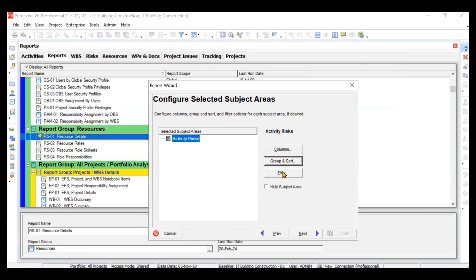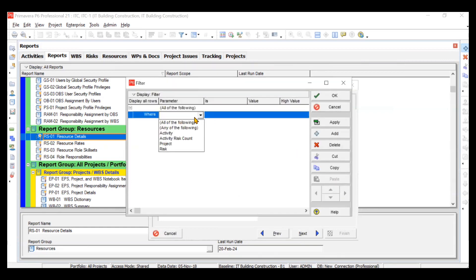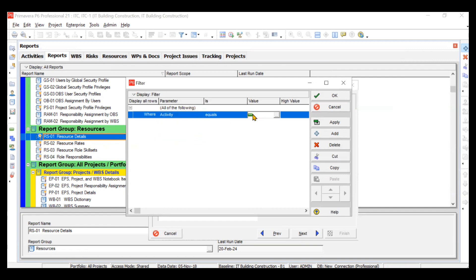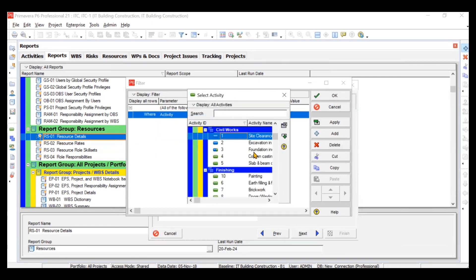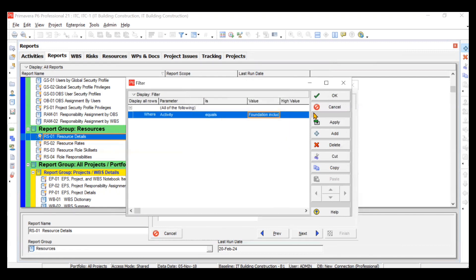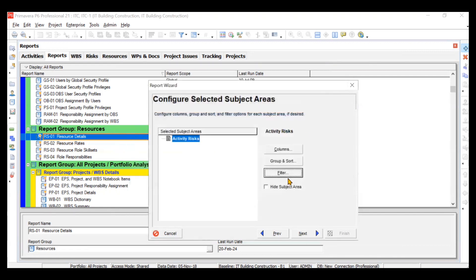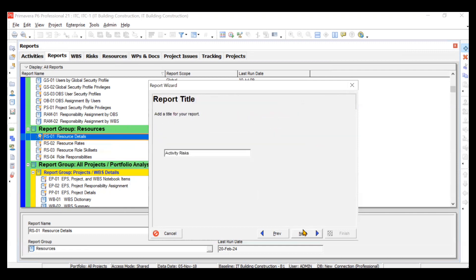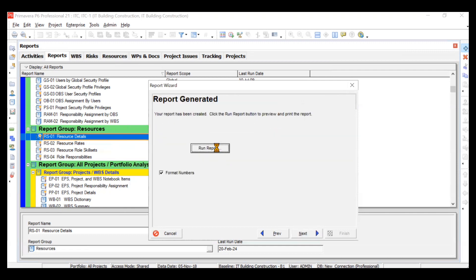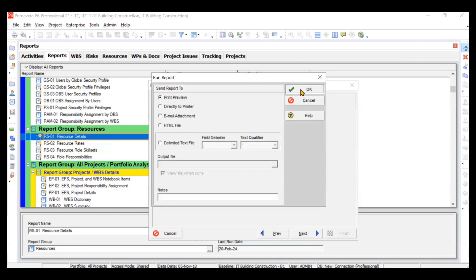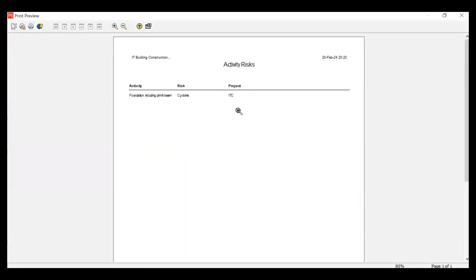You can group, sort, and also filter — for example, where the risk is less than a value, or where the activity is a specific one. We have created a risk for a particular activity, so we'll filter to that activity only. After creating the filter, click Next, then Next again, then Run Report and Print Preview. You can see the risk for the activity 'Foundation Including Plinth Beam' is displayed, the project name is visible, and the risk is 'Cyclone'.